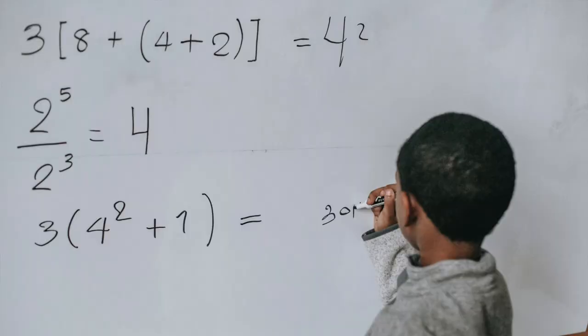I don't want you to get worked up here. We're going to do a real quick overview. Calculating materials is essentially middle school math. It's surface area. It's linear feet. It's units or pieces, right? Because what I mean by pieces is you don't have square feet of toilet. You're buying a toilet. You don't have linear feet of door. You're buying 1, 2, 3, 4, 5 doors, things like that.